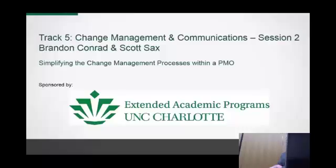And it's been really easy to bring that up in our change advisory board meetings, saying, all right, this person here is going to be needed an extra 2 months. We can pull up this Excel spreadsheet and make those changes on the fly for that person, so it's not affecting the whole project. It's just taking an estimate that this person's working on this project for X amount of time. That's really been helpful for us, a new addition to our advisory board meetings. So, any other questions?